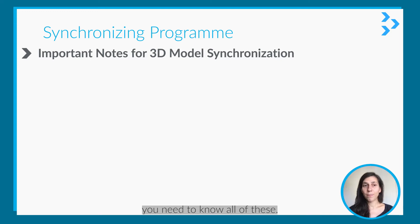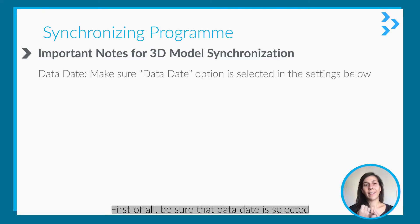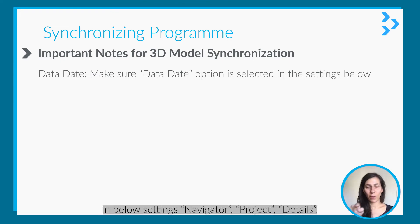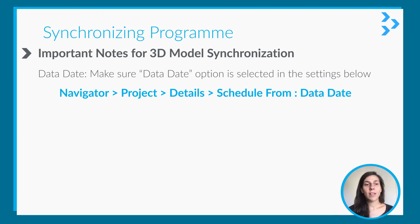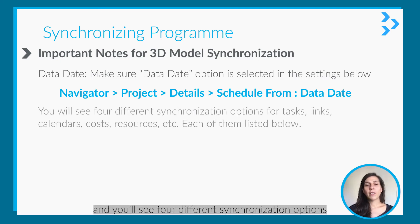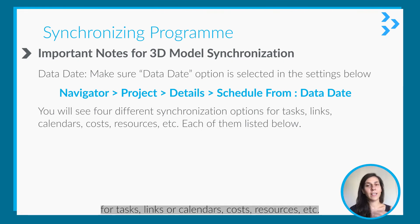In the program part, there are important settings to know. First, be sure that the Data Date option is selected in the below settings. Navigate your project details schedule from Data Date — that's really important. You will also see four different synchronization options for tasks, links, calendar, cost, resources, etc.